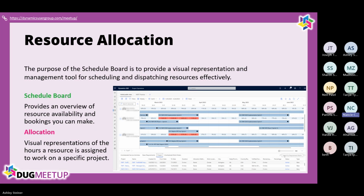You can do both. Yeah, because I used to use Microsoft Project to try to do all of this together, and I was trying to import things, and I found it very tedious. So this is a lovely view of being able to look at people across all of the projects they're working on to determine if they're over allocated. Yeah, and again, this screenshot is pretty terrible, but you can see there's a name, then their capacity, what percentage they're allocated, and then the big bars underneath are which projects they're actually assigned to. And it does it automatically.